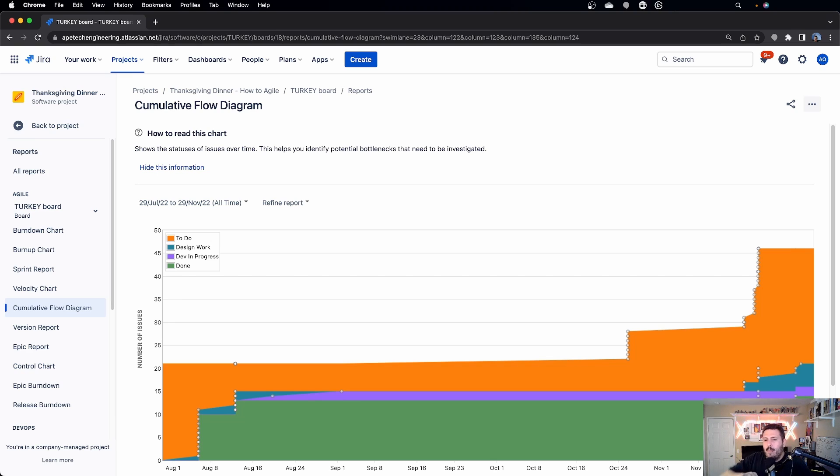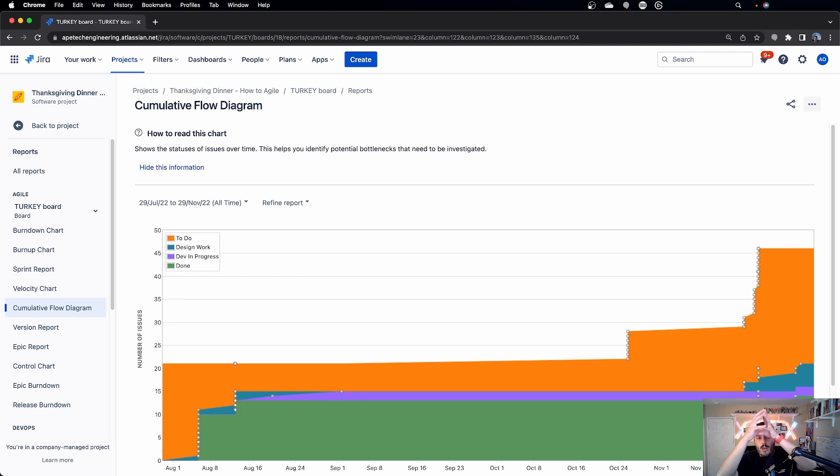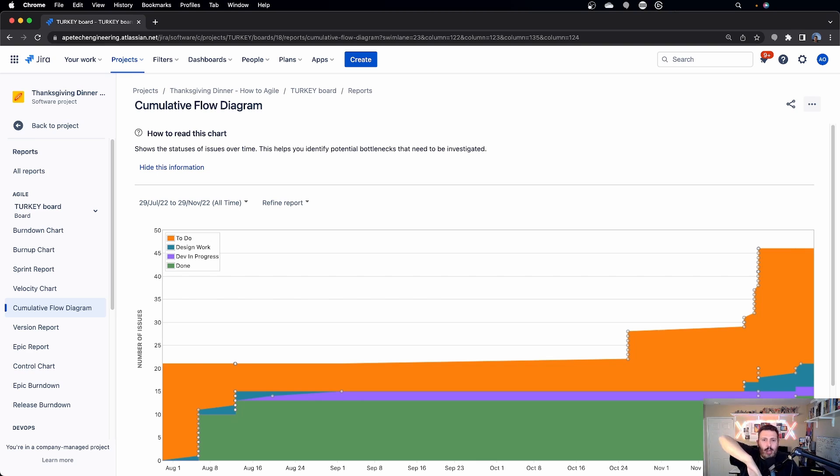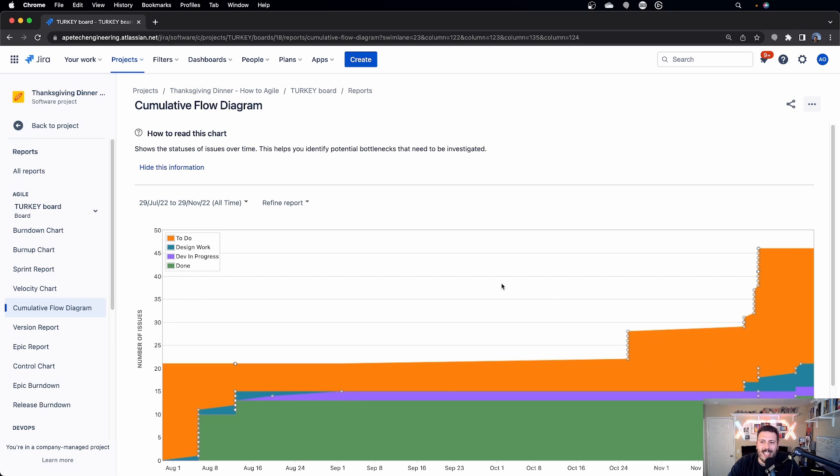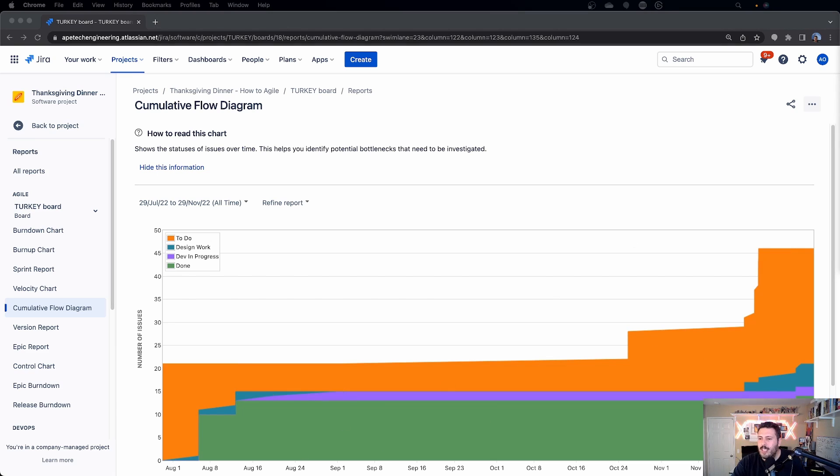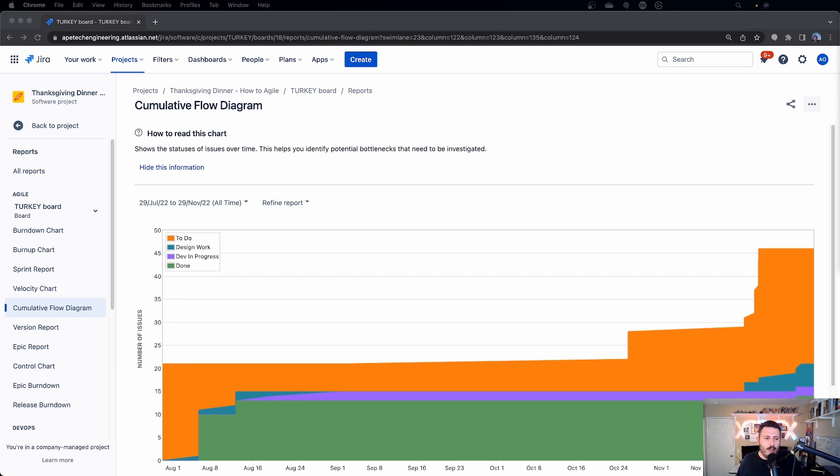And your done should be doing something very similar. Well, done shouldn't go down, but done should always be in an upward trend. Your team should always be closing work. And so ultimately what you want is the green, the done work, to absorb and consume all the other colors. That's when you know you're done. But again, if you're playing kind of an infinite game, you want to see your green over time, whatever length of that project is, you want to see it go up. Eventually, hopefully someday it'll close, but you should at least see those trends and this thing will paint that picture of what's going on. And so this graph I really, really like for that reason, because it does tell you a lot of this information that maybe sometimes you don't even know it was valuable. You didn't even know existed. And so hopefully this kind of paints a better picture for what a cumulative flow diagram is and how you use it, because it's super valuable in my opinion.